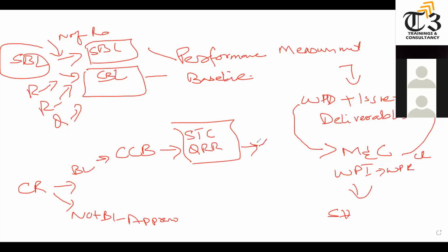Once approved, this approved change request will be given to the executing guys so they can start working. And then as a project manager, you will again update the stakeholders that change request was filed and it is approved. And then you will update the baselines so that they now reflect the newer information. And that's how the whole project will continue.